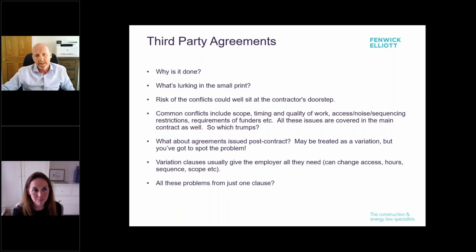So take a typical agreement for lease, for example. That's predominantly a property document, but it will say if this work is not finished by a certain date, all bets are off. So an agreement for lease will call it a long stop date. Basically, if the work goes beyond this time, all bets are off.